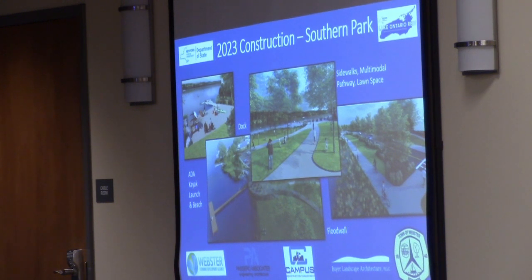The dock that will be going in replacement of the existing dock, lots of sidewalks and green space and plantings and multimodal path, which is almost complete, but a lot of the plantings and beautification are still outstanding, and then the flood wall is the big ticket item for next year.